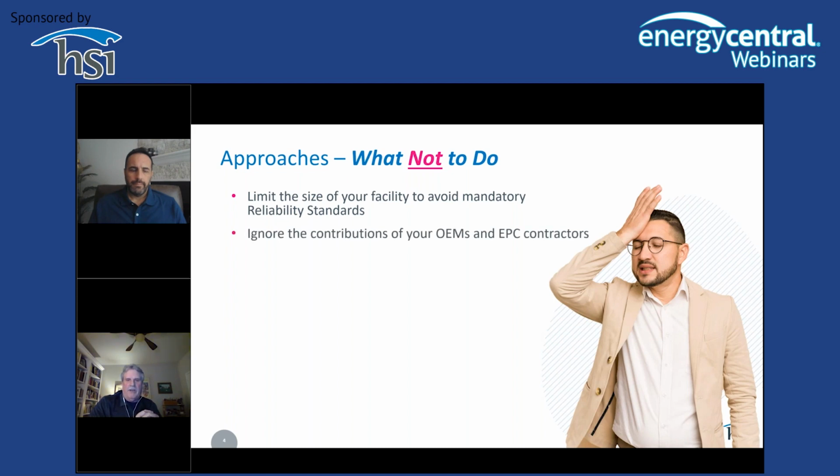Ignore the contributions of your OEMs and EPC contractors. This is especially important for companies that have projects under development. For some of the data that's required for the NERC standards, the OEMs and the EPC contractors know that inherently. If you get your request to them early, they can help you out rather than you trying to track them down after the fact, saying, oh, wait a minute, we have to fill out these forms and do this data request. It's much easier to do ahead of time. It's real easy. In fact, if I was doing a contract to build a facility, I would include this in the deliverables, that you will give me this data, and I'm going to be ready to go on day one. Next bullet.